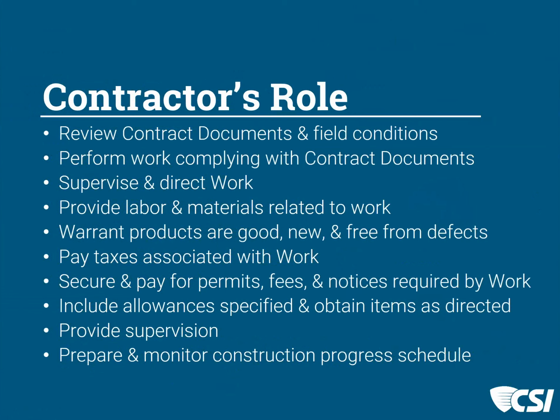And they're required to, if we have allowances in the job, pots of money to charge things against, like fixing unsuitable soil, keep those in proper order and accounted for so that they can be reconciled at the end of the job, and that they monitor construction progress.